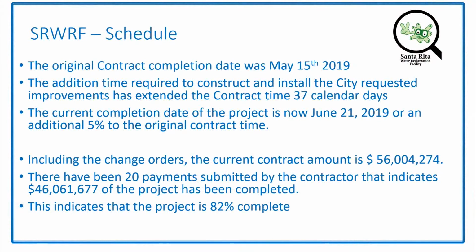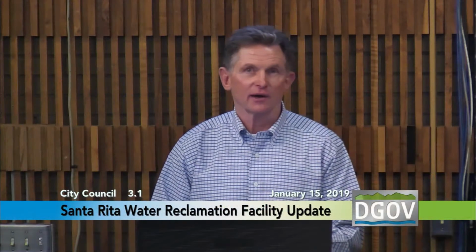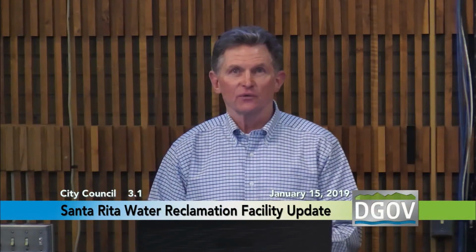So getting into the schedule, that plays into the schedule a little bit. So the original contract completion date was May 15th of 2019. Because we've asked for so many change orders, the contractor has added 37 days to the contract. For him to do all of the work that we've requested, he needed some additional time. So we've agreed to 37 additional days. So the completion date is now June 21st, 2019, which if you look at a 2-year project, it's only 5% of the original contract amount. So again, that seems very reasonable to us.